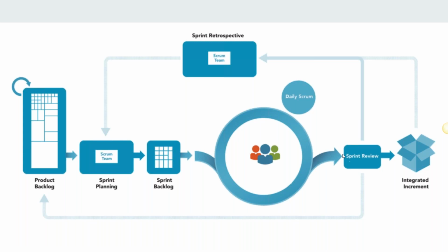So the product owner says, okay, what do you think that we can do as a team? This is very critical, guys. So you guys have to tell me what it is that we can do. The product owner and the development team together come to a consensus saying, hey, product owner, we will do payment using credit card and payment using Apple Pay this sprint. So they're all in a consensus and they meet a middle ground. This is how your sprint goal gets set.